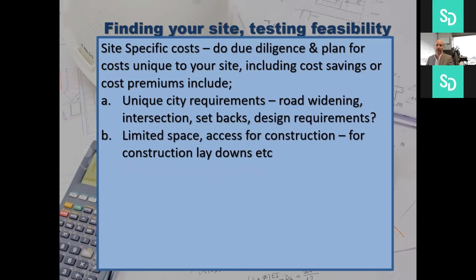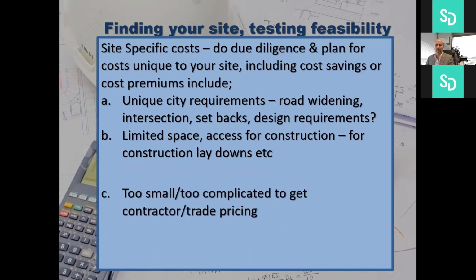Limited space. Noise is limited space, not only during construction, so it's the access of the trades to get onto construction and actually construct, but also where the materials are going to be laid down. So if you have a project that's being built to property line, you really do have to think about where your materials are going to be laid down as you load into the building. Do you have to actually have a road closure or partial lane closure? That costs money and increases timelines.